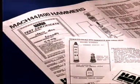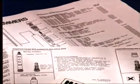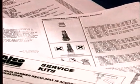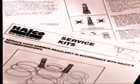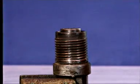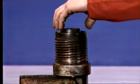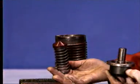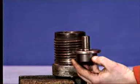When you're commissioning a new Halco hammer, keep the factory test certificate, spare parts list, lubrication details and commissioning instructions in a safe place. Each hammer is fitted with a spring-loaded non-return valve assembly to stop the hammer flooding when drilling underwater. In dry drilling conditions, you can remove the assembly to increase penetration speed.